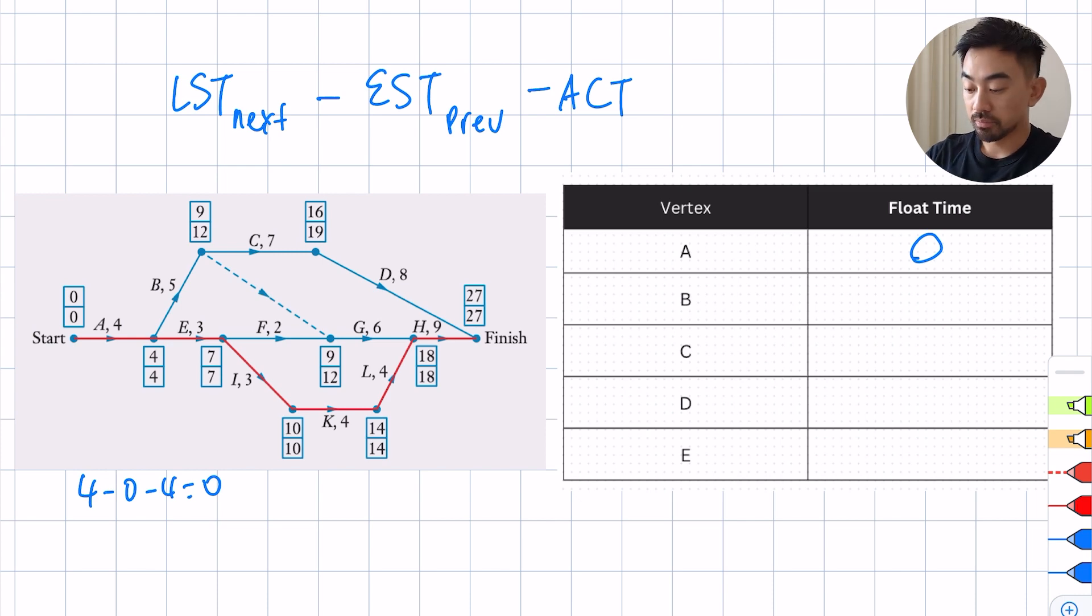Let's look at B. So B is there. I look at the next late is 12 minus 4 minus 5. B is going to be 12 minus 4 minus 5, so I think that is 3. So the float time for B is 3.